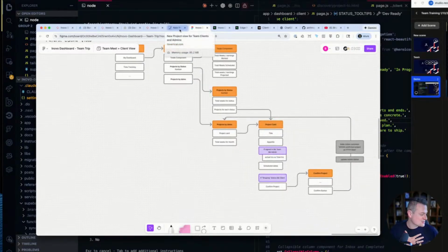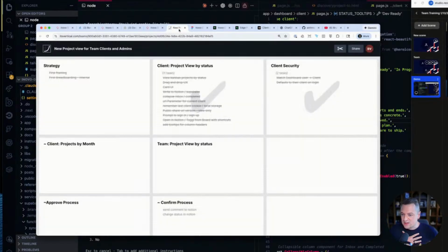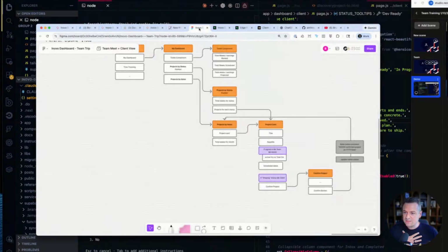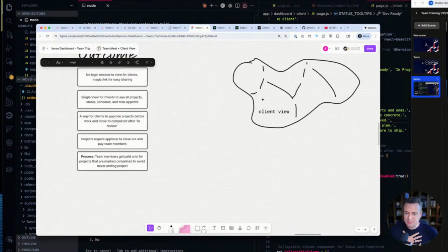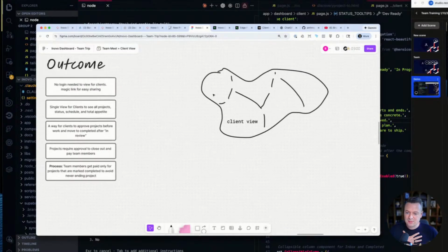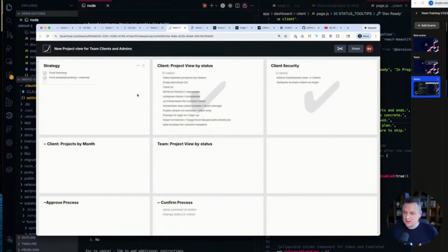We've been building this as we go, and so we used the task grid, what we call it. Each one of those is a little component. So if we take a blob, we call this random blob a project here. There's lots of things that stand on their own here. So this client view, we technically could build the back end, build the front end, and then we can go in and actually ship that, start using it, and then go to the next thing. And these are sort of independent parts of the project.